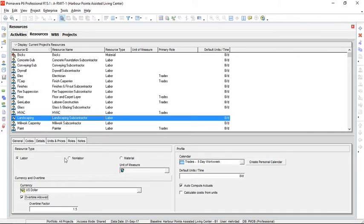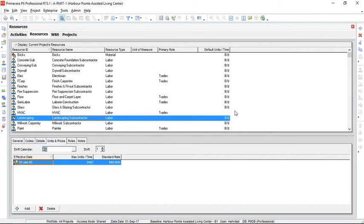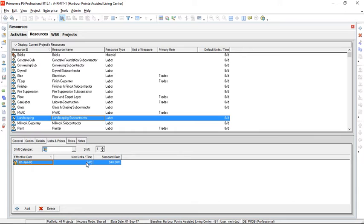Let's check units and prices. The maximum units per time is 24 hours per day. If you look at default units per time, it is 8 hours per day, and it shows we have three landscaping subcontractors working simultaneously on this project. So we have allowed overtime to landscaping subcontractor.